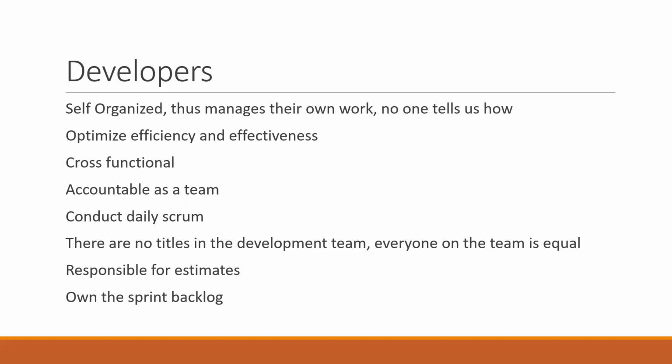If they tell you they're going to be away or available, or whichever contractors you have, then you can start breaking it down based on iterations or sprints. How many sprints is it going to take to accomplish that specific project? Capacity for 6 months, I'm saying PI planning or release planning, it all depends. If you have not done any planning in the beginning, that means you need to do a PI planning or a release planning.